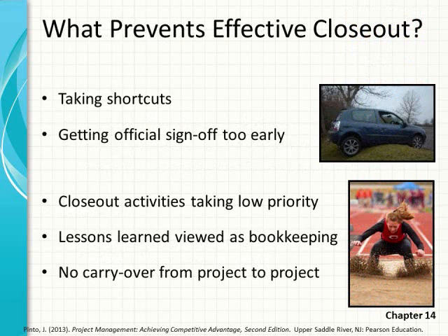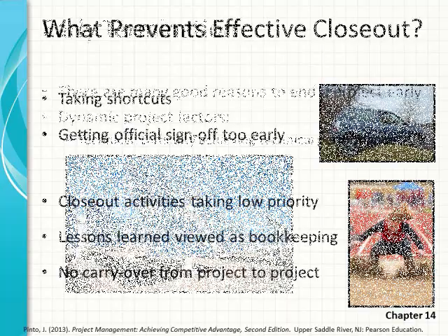Now, what prevents effective closeouts? And that's, well, taking shortcuts or getting official sign-off too early before everything has been put to bed. Now, also what happens is closeout activities, well, they take a lower priority to those active projects that are running in parallel with yours that is closing. Lessons learned can often be viewed as a simple bookkeeping exercise and not lessons to be learned and passed forward to future projects. And there's no carryover from project to project. A lot of different difficulties in having an effective closeout.